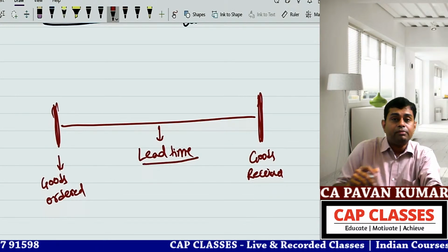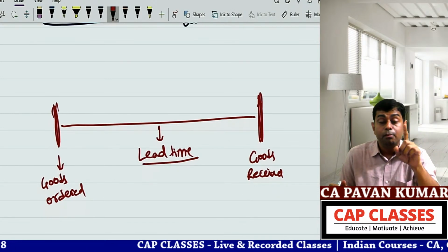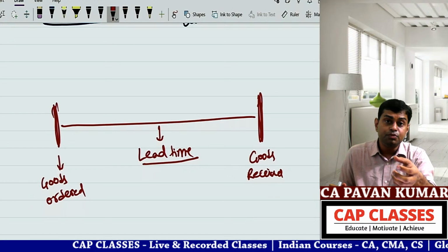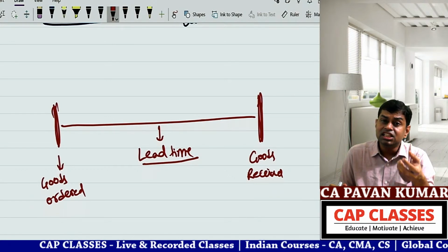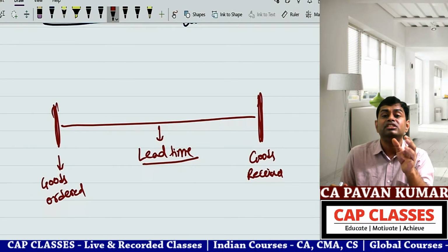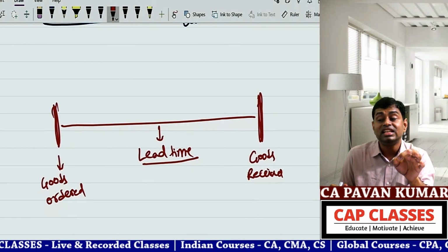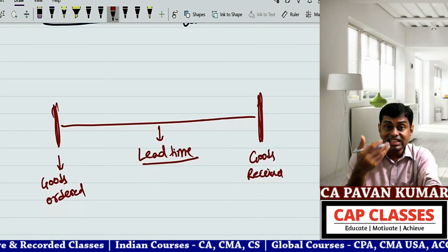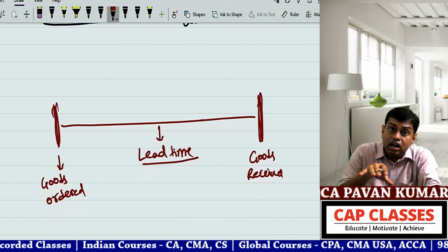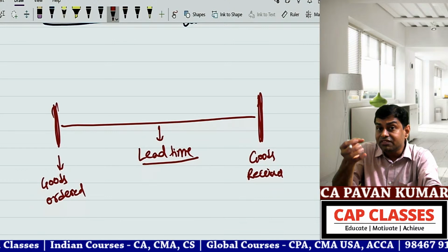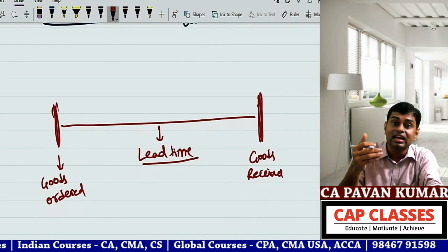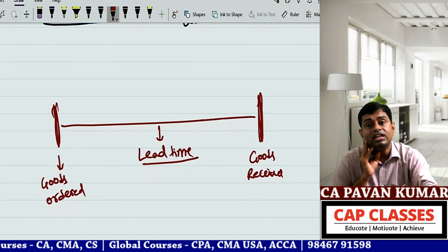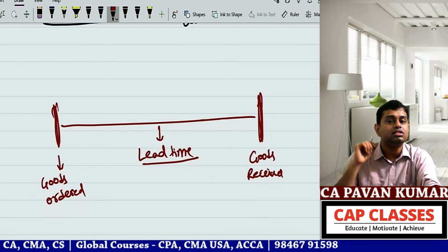Lead time can be of 4 types. Maximum lead time, 8 weeks in our example. Minimum lead time, 4 weeks in our example. Average or normal lead time, 6 weeks in our example. When you reach danger stock, if you are begging, sometimes the supplier may give an emergency lead time of 2 weeks. So the time gap between placing an order and receiving the goods ordered is called the lead time. You should consider lead time also while placing an order or while deciding on the inventory levels.